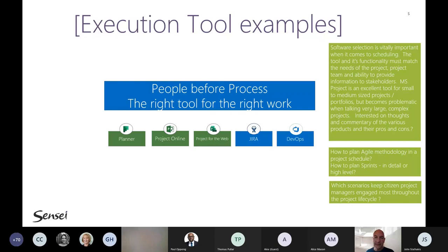How does Agile deal with variation? The variation in an Agile world, well, there is no such thing as a predefined scope. You get budgets through different sprints, so duration really is the key here. And the backlog that you groom as you get feedback through the sprint reviews, you actually outline those backlogs as potential changes. That potentially means that you need to add another sprint in order to accommodate for that. So that's how generally in an agile world change is managed.